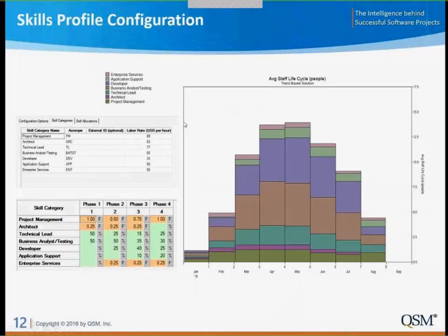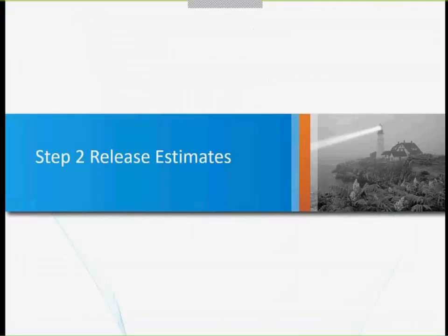We can have a boxcar load that has just level of effort for various activities. We can have a buildup that peaks early and ramps down. We can have one that peaks more towards the end. We can increase or decrease the various activities. We can essentially model just about anything that happens. So it provides a whole other level of sophistication to the resource planning and the portfolio budgeting. So those would be our configurations and our setup to get us in a position where we can do the